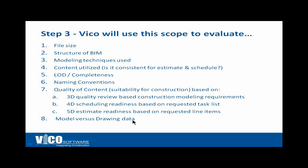We'll also compare the drawings to the model system by system, and we'll find where those typical problems are. For example, you might have a load-bearing slab that needs different concrete, and that's noted in the drawing detail but not in the model. So we would call out that if you're going to use this model for estimating, you'll want to note that that slab has different concrete than the standard slabs. There are many inconsistencies like this — dealing with penetrations in slabs, the way walls are done — and we're expert at finding them.